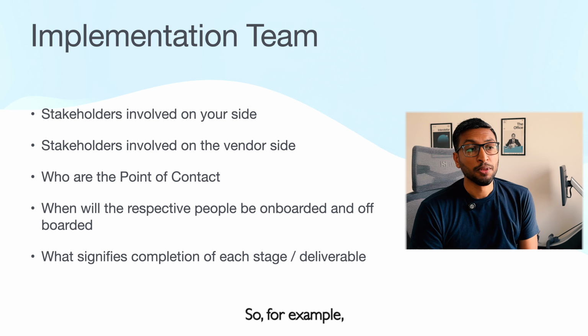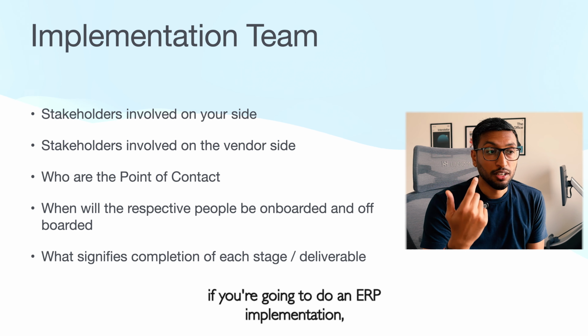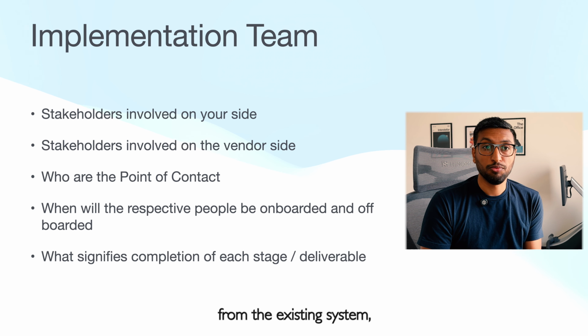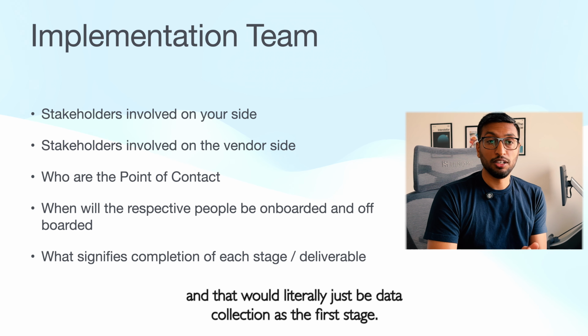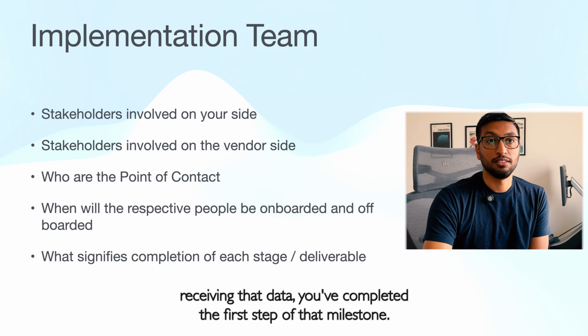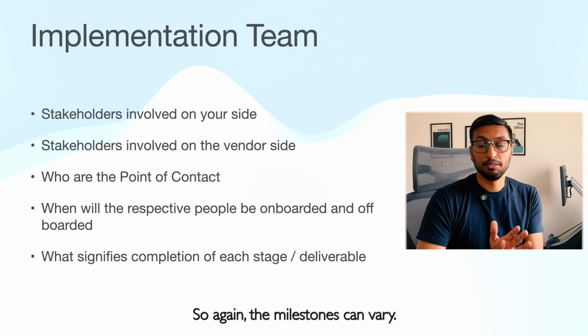So for example, if you're going to do an ERP implementation, the first thing would be to get the raw data dump from the existing system. And that would literally just be data collection as the first stage. And upon receiving that data, you've completed the first step of that milestone.